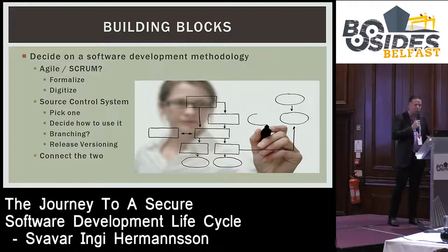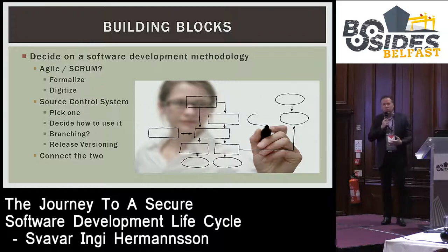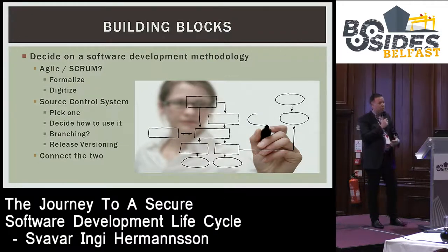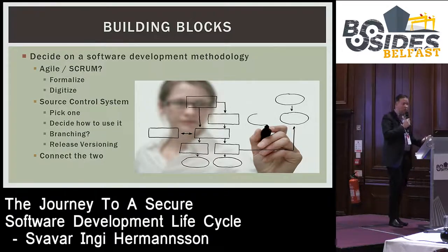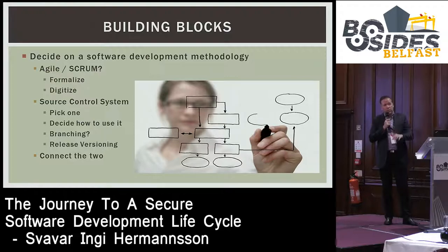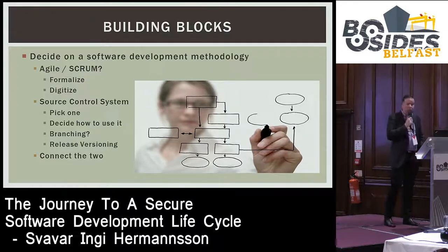So what we had to do is chat with the software developer, and then we chatted with all the other software developers and said, we really appreciate it if you want to do optimization of our services, that's really positive. Also, if you see some security bugs or any software development bugs that you want to fix, we request that you talk to either the business owner or the Scrum Master to get a task for that particular thing, because we want to be able to track every code change to a particular task. And he got on board.